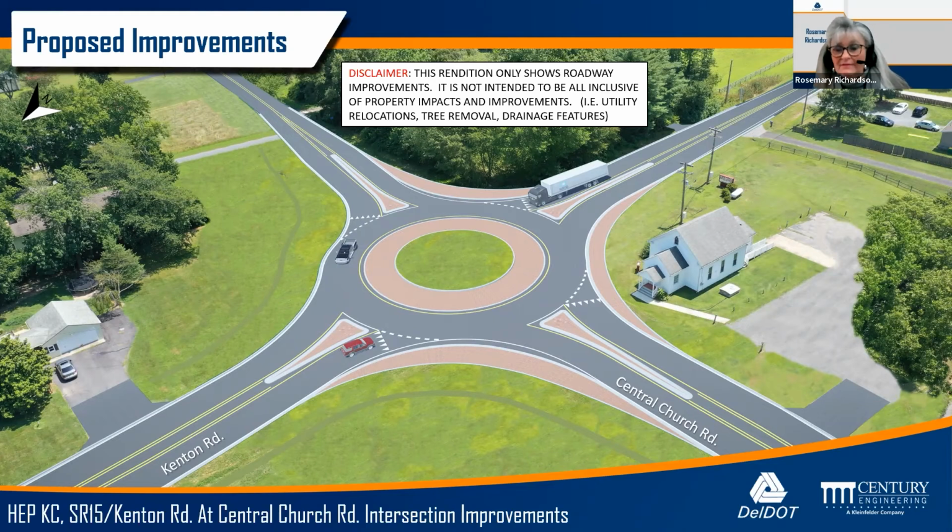Once we receive that information, in order to provide compensation to you, we either prepare a waiver valuation if it's a non-complex acquisition, or we hire an independent fee appraiser. He will come back to us with an actual just compensation dollar amount. We will prepare documents, and those documents will be presented to you. And then you will have time to review the documents and make a decision whether or not you will accept them. Typically, most people will return the documents, sign, and then we go to settlement with you. And then you will receive your monies. Thank you.